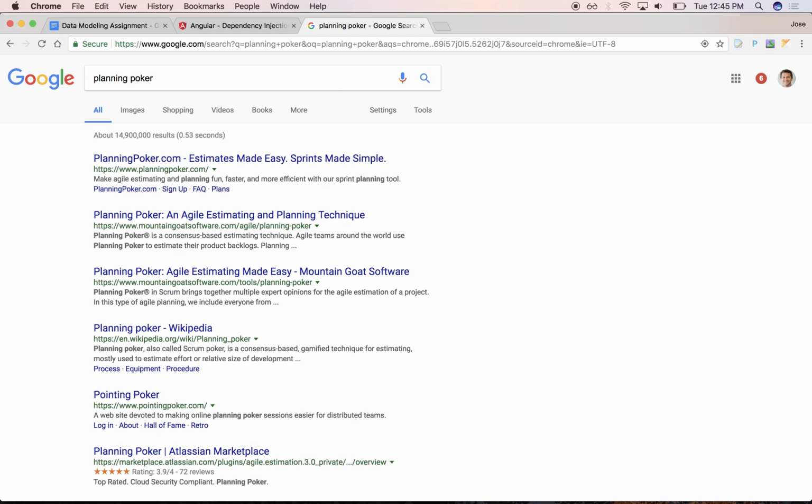How do you think a particular task is going to be compared to other tasks that we have done in the past, right? Is it 1 point? 2 points, 3 points? It's a very subjective feeling of what you think a particular effort is going to be, and you compare it against historical votes that you have done in the past, right?